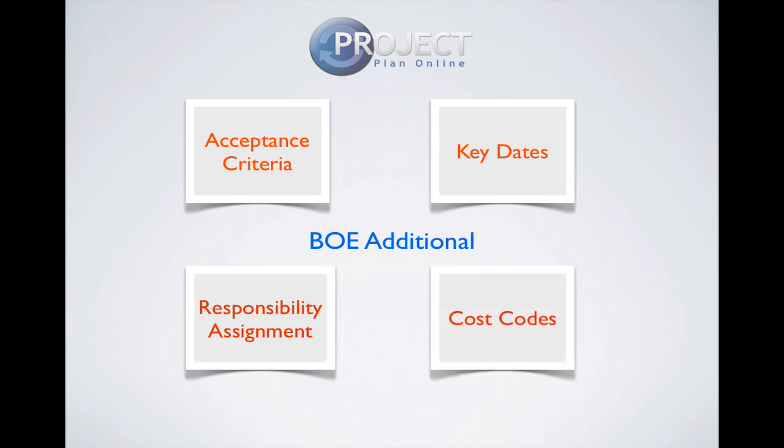Finally, you can put your cost codes. Your cost and booking code can regularly be different from your WBS code, so you provide mapping back into your cost management system. So that's it. A great tool. There is a bit of work involved, but you'll see some real benefits from it.